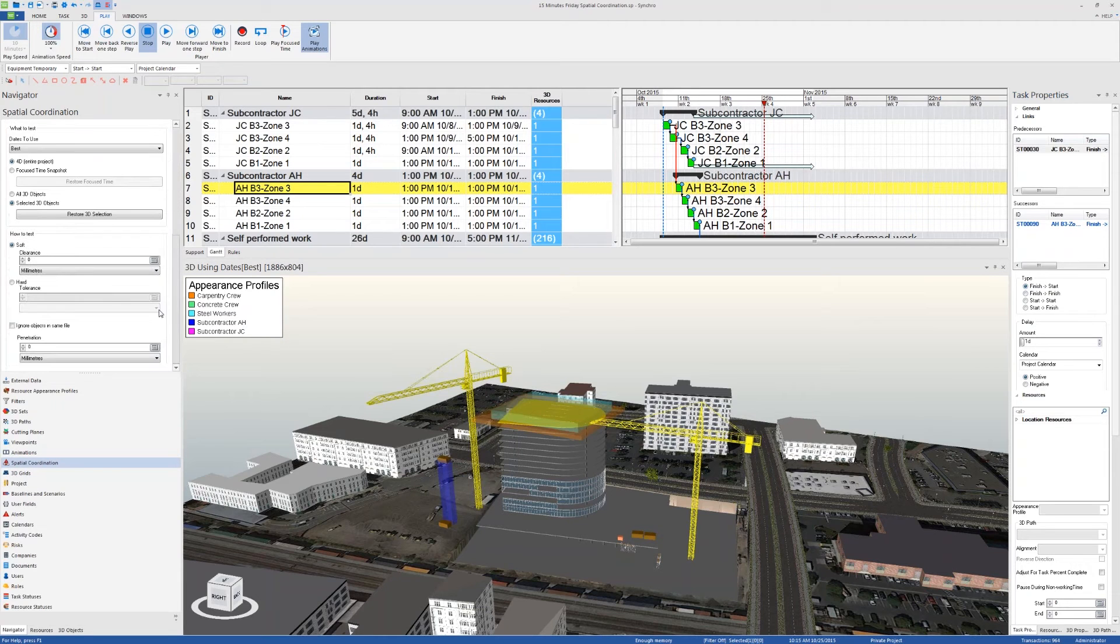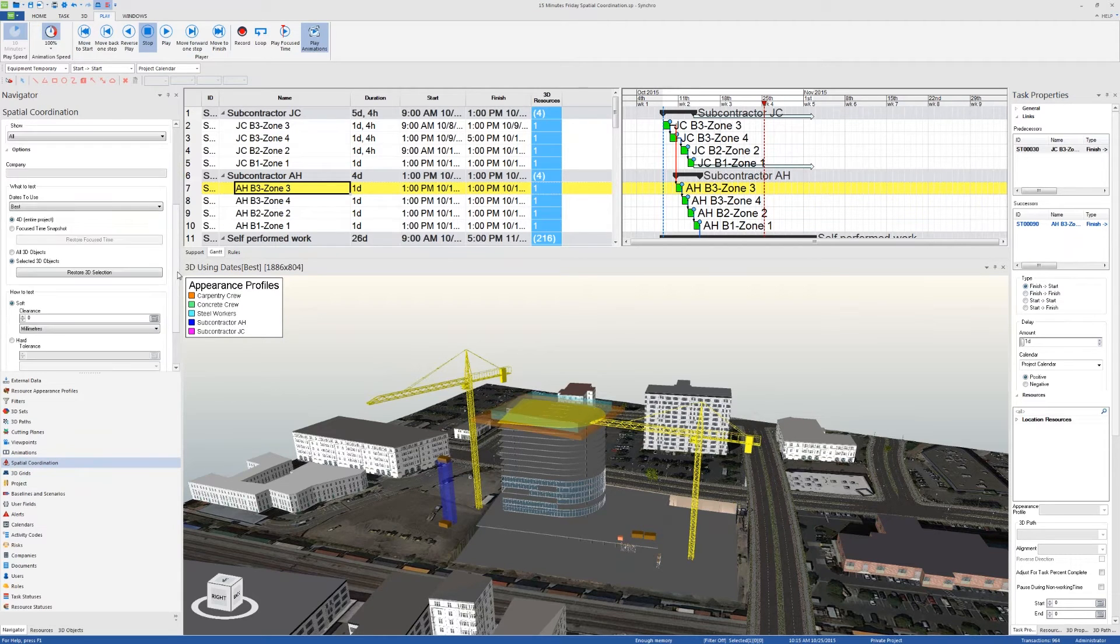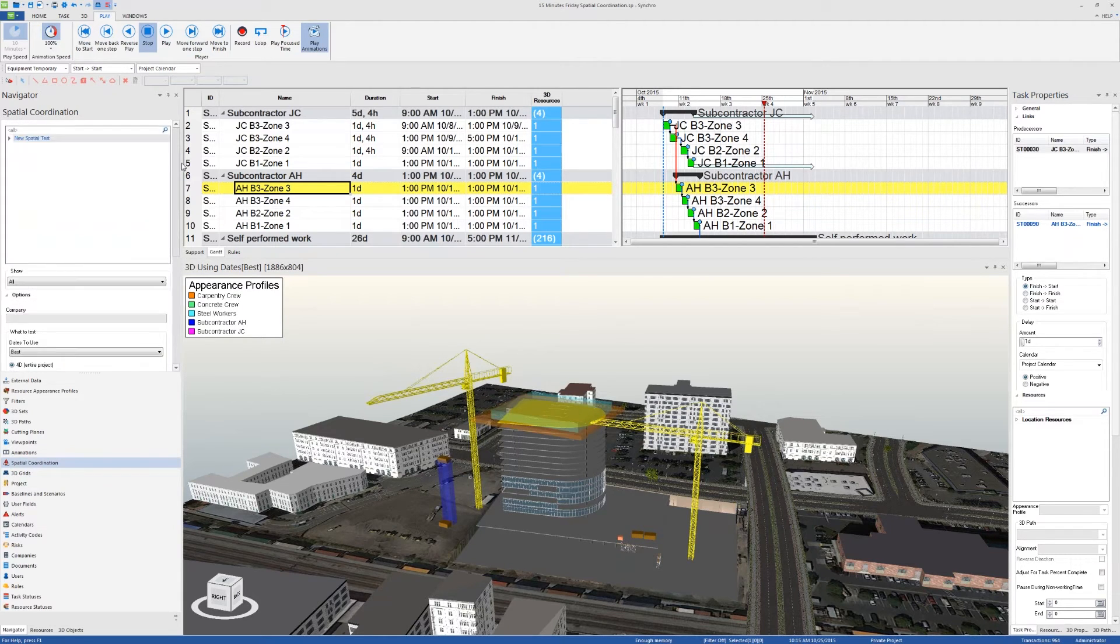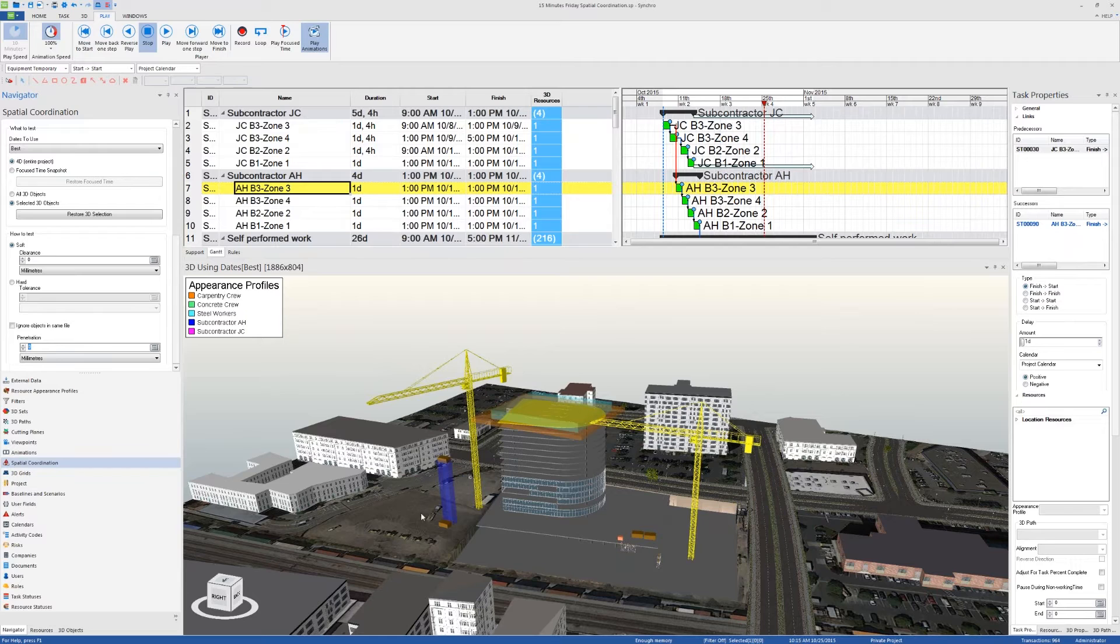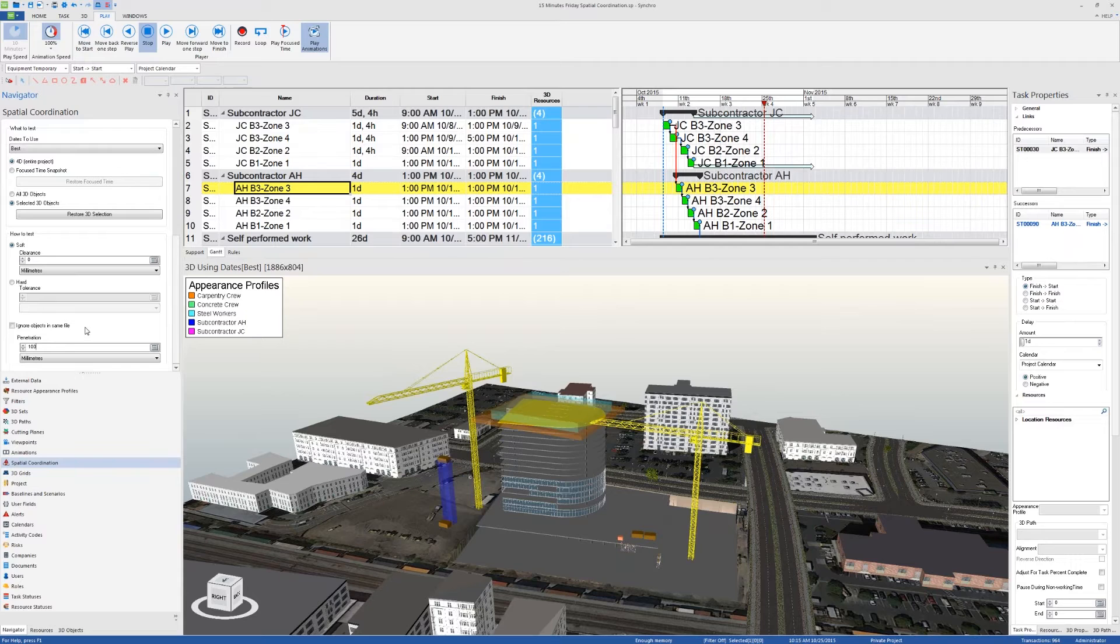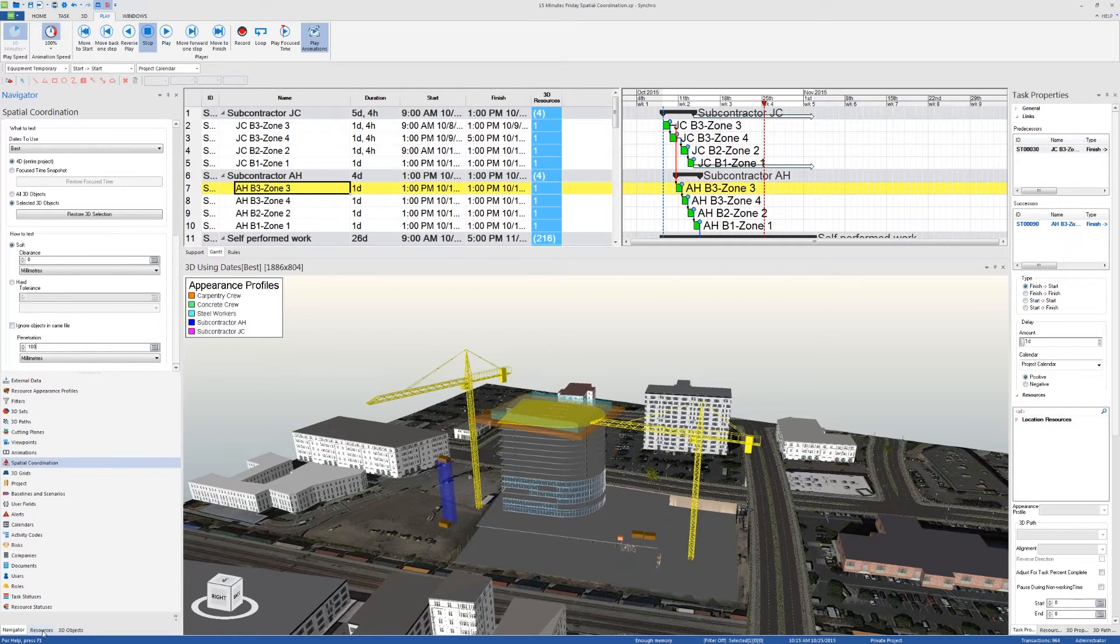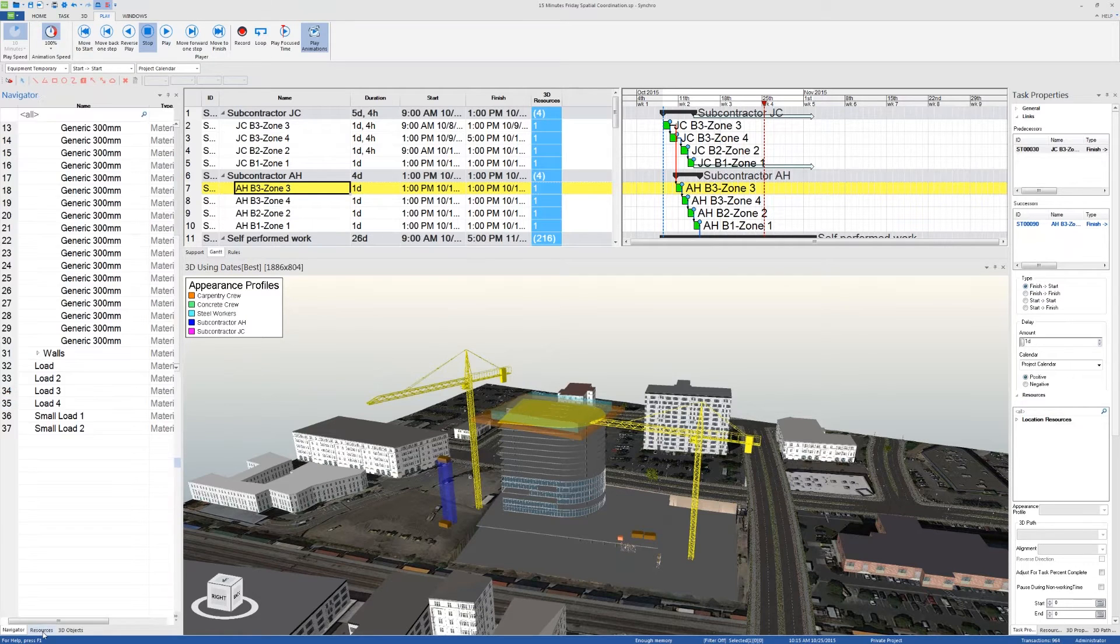The way to detect these is to set the penetration in the options for that spatial coordination to a value different than zero. When this value is set to zero, the clash detection will run at the very beginning and at the very end of the 3D path. If I set this to 100 millimeters, then the clash test will run at each hundred millimeter increment of that 3D path.